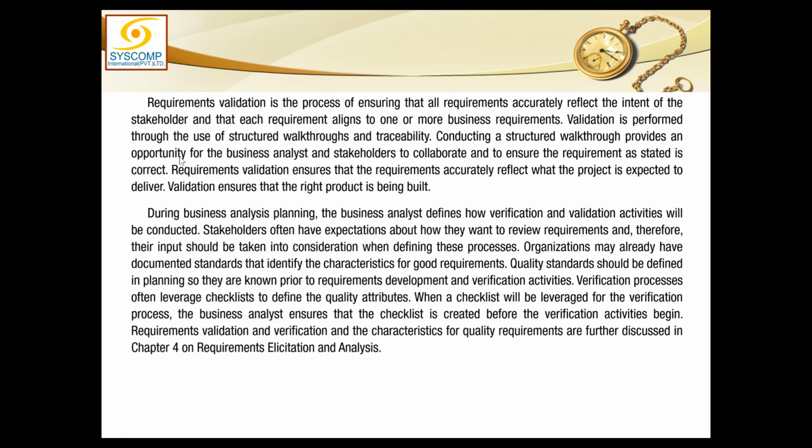Validation is performed through the use of structured walkthroughs and traceability. Conducting a structured walkthrough provides an opportunity for the system analysts and stakeholders to collaborate and ensure the requirement as stated is correct. Requirement validation ensures that the requirements accurately reflect what the project is expected to deliver. Validation ensures that the right product is being built.